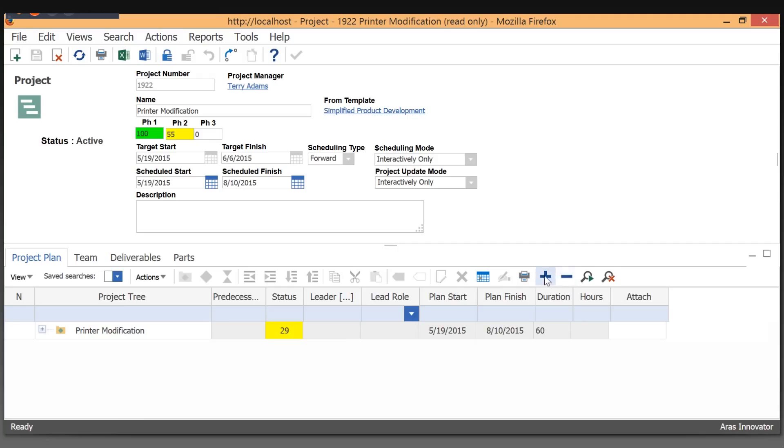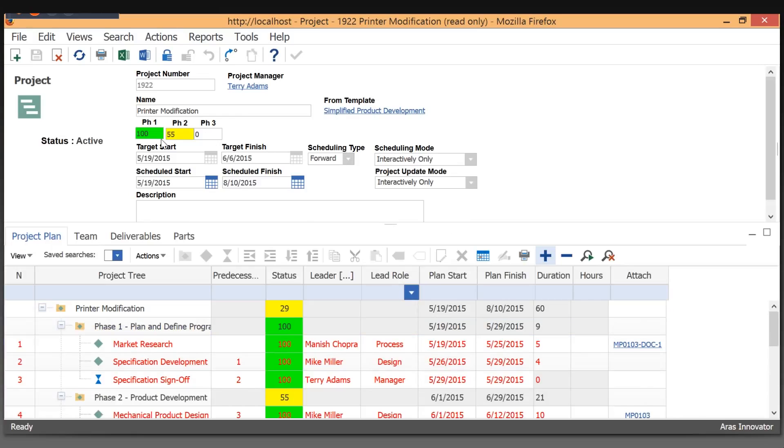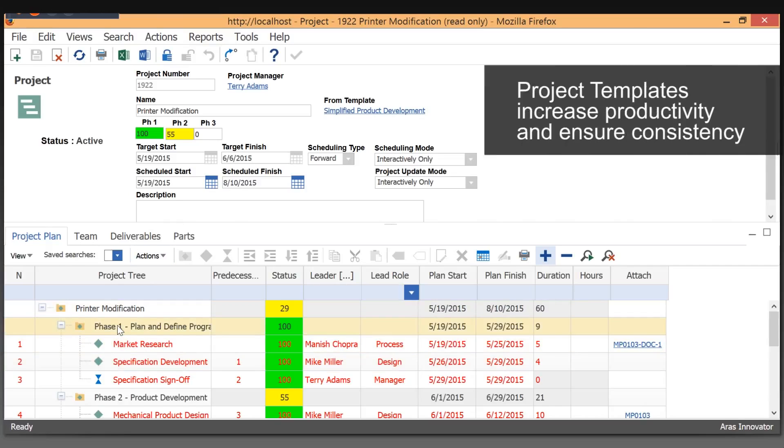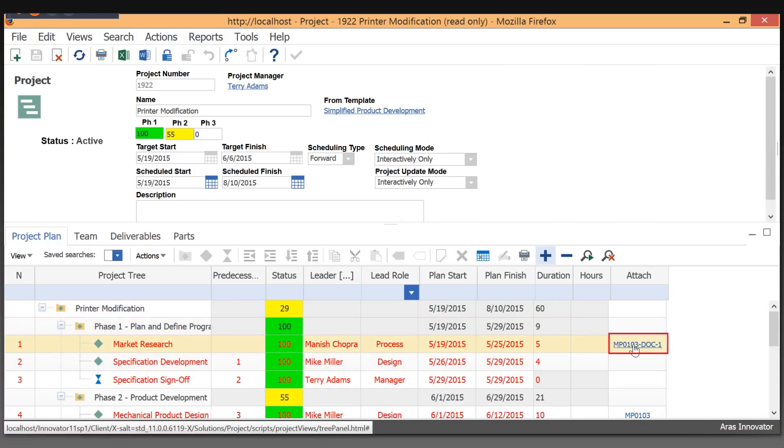The project is broken up into work breakdown structure and activities. Those activities can have multiple tasks associated with them. At the top here, we automatically calculate the phases based on the work breakdown structure. We also support templates that project managers use for creating or instantiating new projects, and those projects can have template documents attached to them.